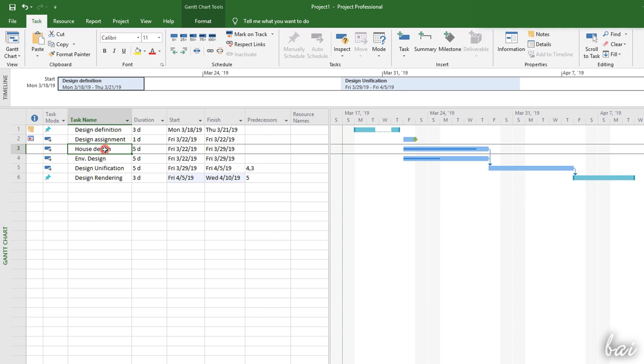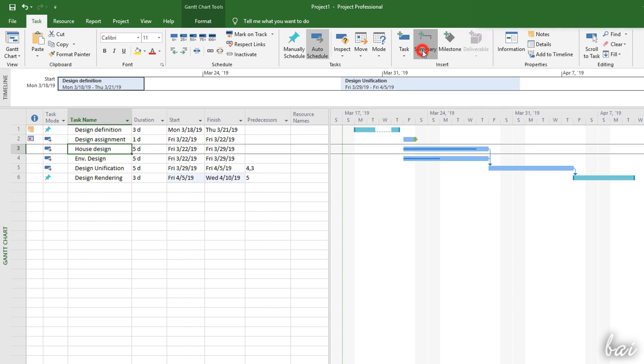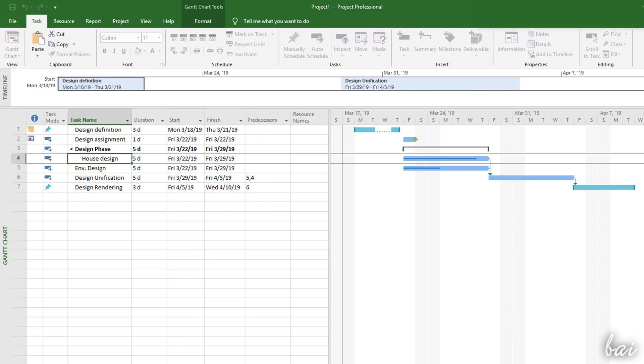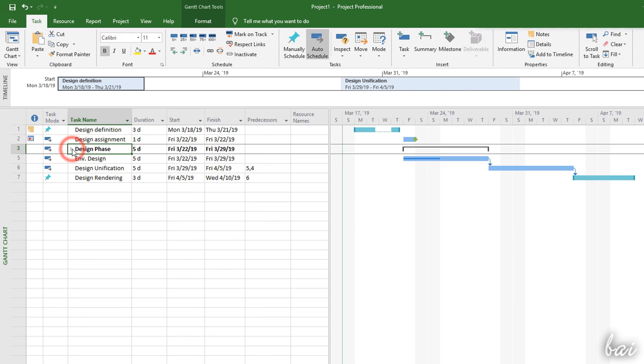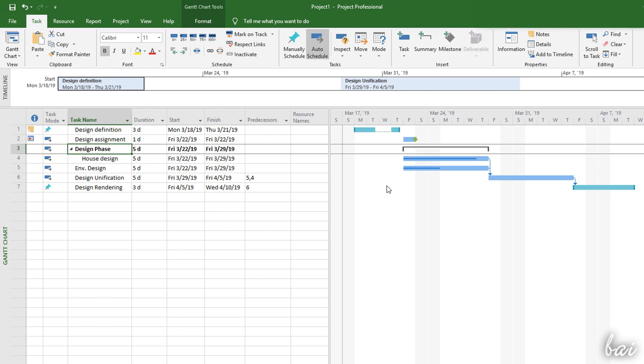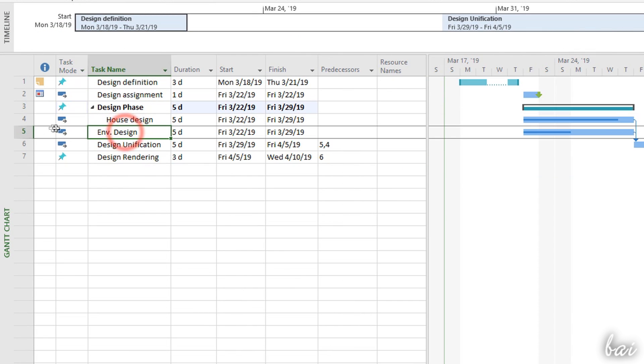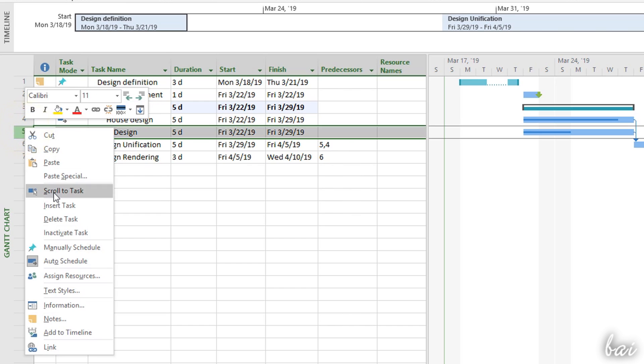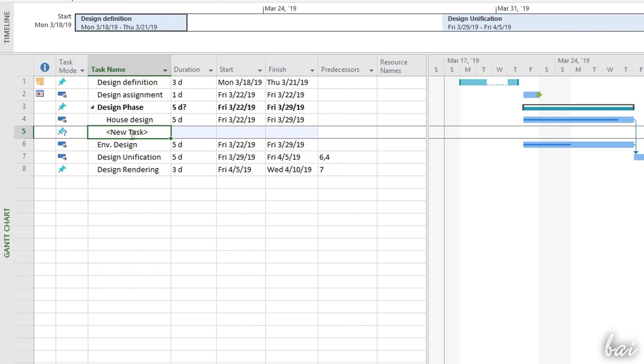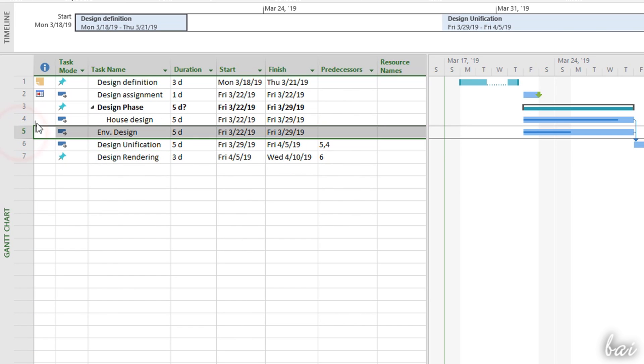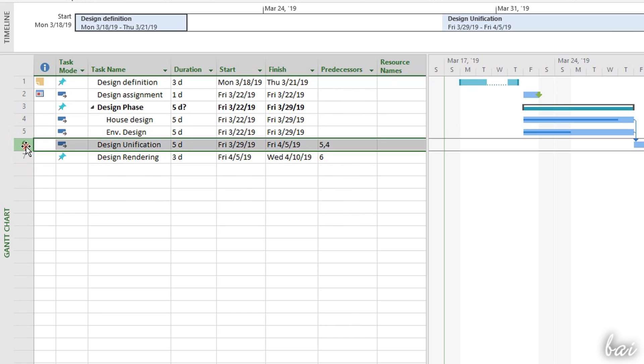The summaries are collections of tasks grouped together. When you create one, this is added in bold inside the task sheet, including the first task that was previously selected. Then you can rename, set it manually or auto-scheduled, and create other tasks within it, or include others by clicking and dragging these inside it.